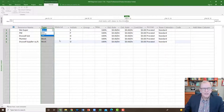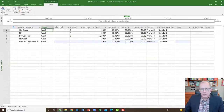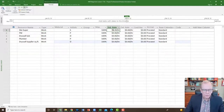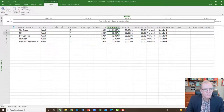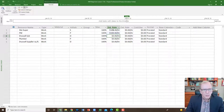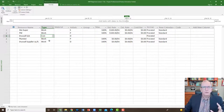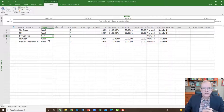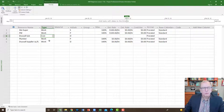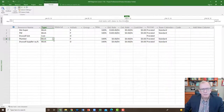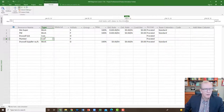Work means you're paying this individual by an hourly rate. Even if they're on salary, work is the closest you'll get — just figure out what their salary works out to hourly and put that rate in. So let's say site super is $100 an hour and PM is $100 an hour. Drywall sub we don't want as work — we want them as a cost. Cost is like contracting the work out: maybe you've got a drywall contractor who'll install and tape the drywall for a fixed amount. Same thing with a plumber — they've given a fixed cost, and we're not monitoring them by the hour.